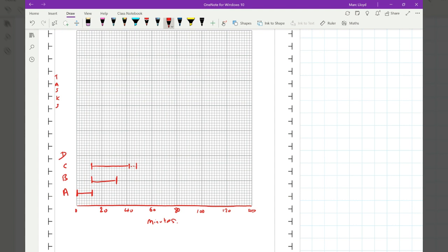Okay, D. The plane is refueled. That also happens at 12. It's 18 minutes in length. 12 plus 18, as if I'm using a calculator, I don't want to make any mistakes, gets me to 30, which is halfway through here. And it doesn't actually need to be finished until 42 either. So that's got a bit of float time in it. Do a little dotted line for that.